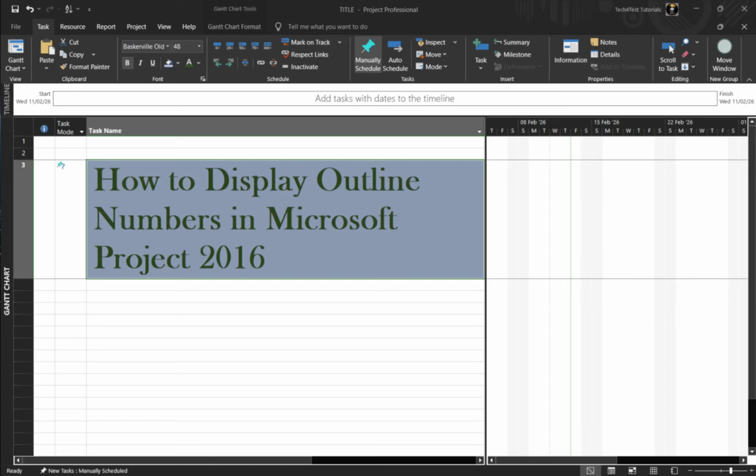In today's video, I'm going to teach you how to display outline numbers in Microsoft Project 2016. Outline numbers are the simple, structured labels that show each task's place in your project's hierarchy, like 1, 1.1, or 1.1.1. They mirror the structure you create by indenting and outdenting tasks, much like a work breakdown structure. The best part is, these numbers update automatically as you reorganize your plan, so they always reflect your current outline.